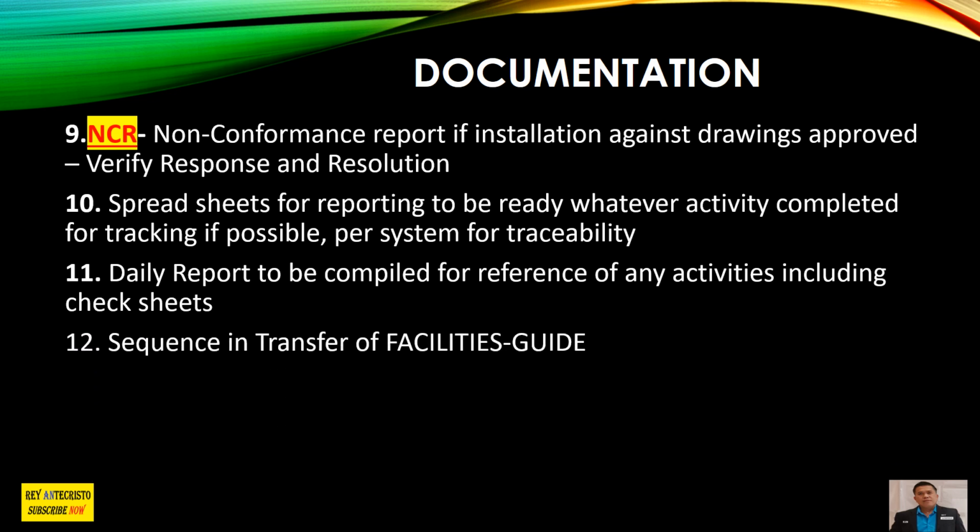Okay. And then number 12, we have a sequence in the transfer of facilities guide. Just like what happened when I was working in Saudi Aramco after the completion of the project. From mechanical completion, commissioning dossiers, and equipment, spare parts, cataloging, all of that will be transferred to Aramco facilities. That's how it works for us.